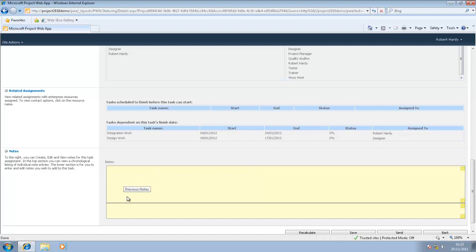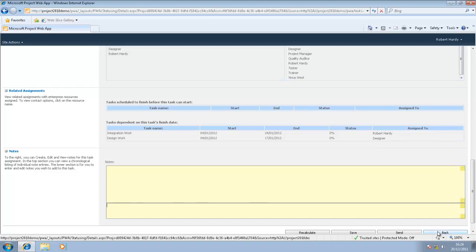Below that, there's also a notes section. This is where you as a team member can provide notes back to the project manager. An example here might be the project manager's assigned you two days to work on a particular task, but you know from prior experience, that task is going to take at least five days. This is where you can voice your concern and send it back to the project manager. For now, I'll go back.